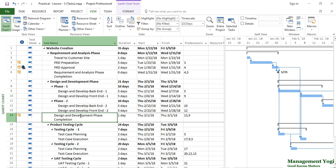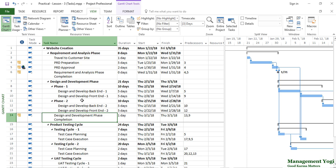The advantage of this ID is you can find out how much expenditure is happening for that particular level, or how much work has completed at that level. This ID is linked to your finance team. At a portfolio level, they can search and find out which component in the project is taking the most money or which component is having the highest amount of work being executed.